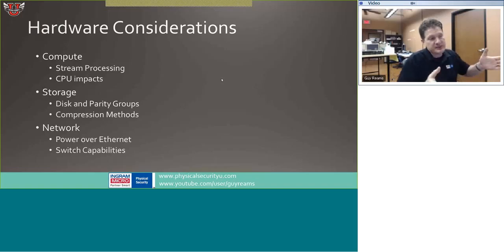See, what happens is they bid the project. Let's say contractor A bids it at 100 grand. Contractor B bids it at 95 grand. Well, contractor A, if they have DVBE status, gets like a 10-point favorite. So even though they were 5 points higher, they get a 10% offset on that bid, so they get more points on their bid presentation, and they're more likely to win when they're a DVBE. So they're hungry for this all throughout the state.